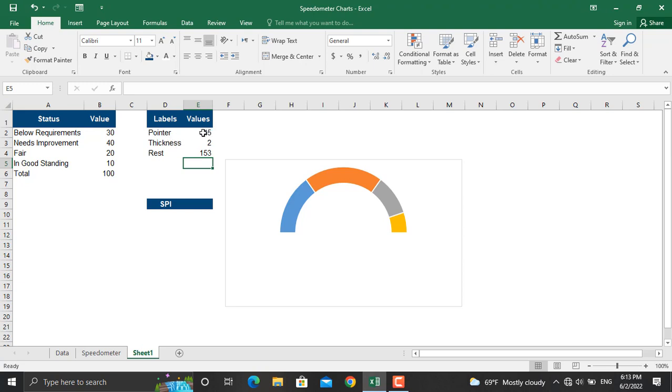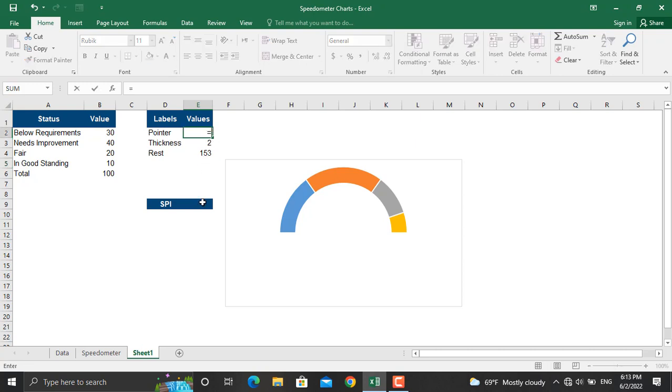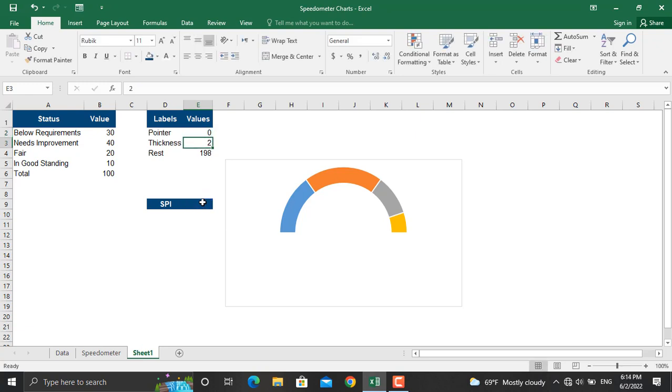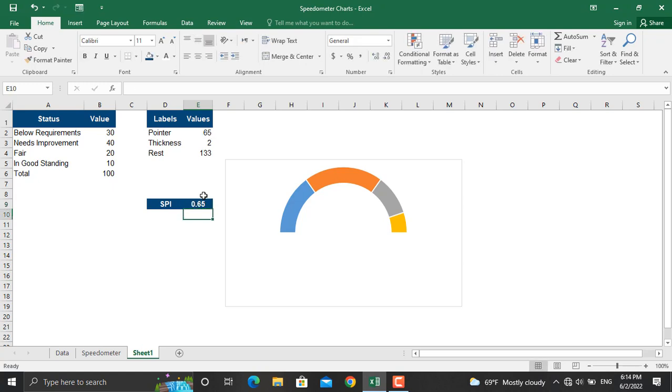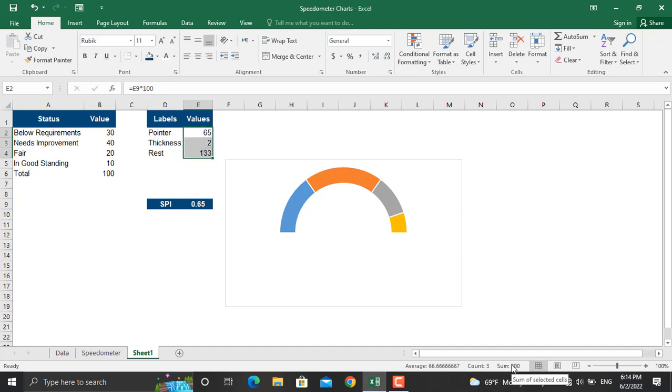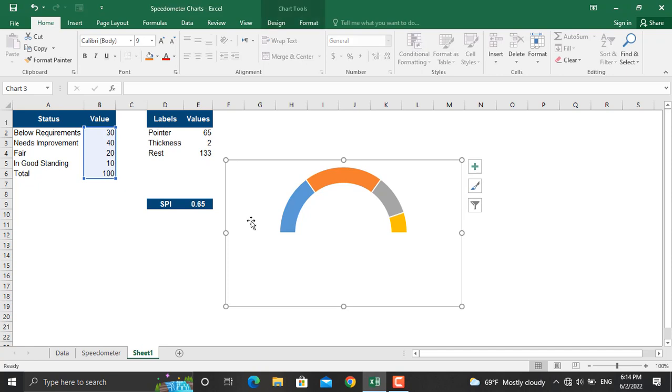Furthermore we will link the value in the pointer cell to the SPI. In here we will write down this value equals to this value times a hundred. So for example if the value for SPI is 0.65, that value will be 65 and the total value of these cells will be 200.